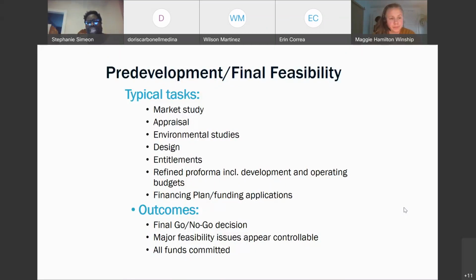Your environmental studies will also include something called a NEPA. I think it's like National Environmental Protection Agency, something. And so it's N like Nancy, E like elephant, P like Paul, A like apple. In that, you, the developer, are required to do an environmental justice narrative, which means, have I notified the community of the findings from this environmental phase 1 report? If your answer is no, you will not get your HUD notice of funding award, meaning it doesn't matter how great your project is, HUD's not going to release that money to you without you showing that you've done your due diligence for the environmental report.